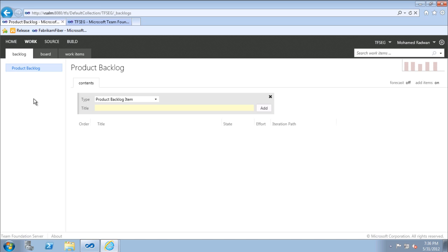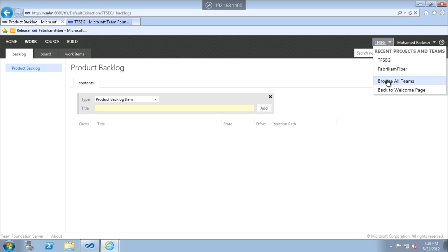So this backlog does not depend on a query as you may think. Actually, I thought about this at the beginning, and I remember when I started searching for the query everywhere, but I couldn't find it. So it is very important to understand how the backlog will show us our PBIs and the bugs without a query. First, you have to understand that the backlog needs three dimensions, which are team, iteration, and area, to show our backlog. So let's choose team 1 from here.